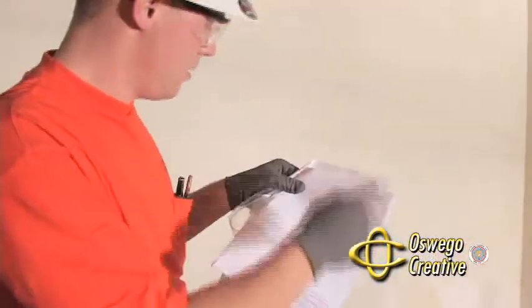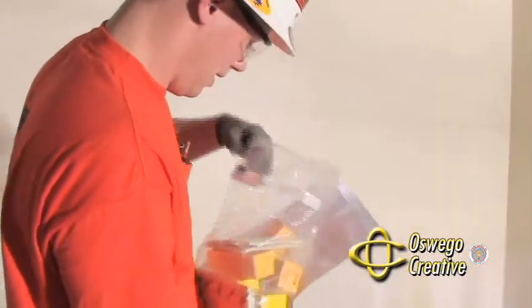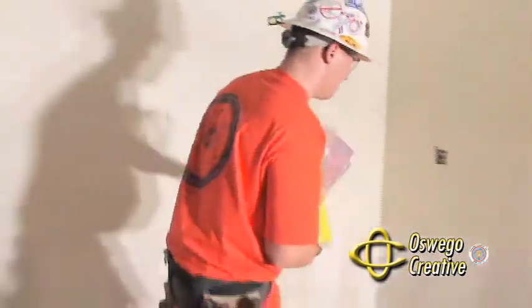You have basically a cart that walks down a hallway with a baggie in it with a CAD drawing with every piece of trim out that's required for that room laid outside the door. Electrician shows up, picks up that baggie, opens the drawing. He's got every piece of trim out that he needs. It's completely labeled and ready to go.